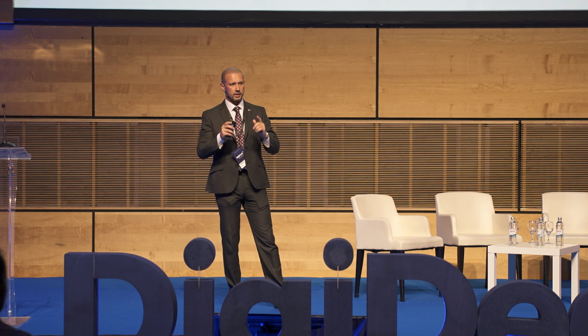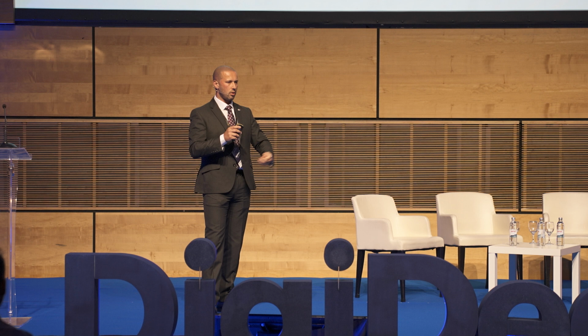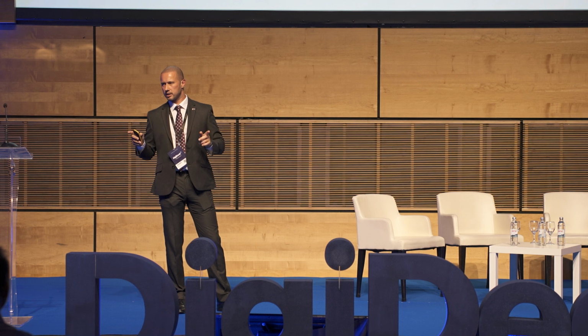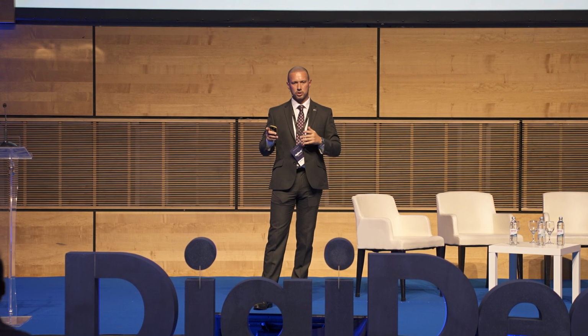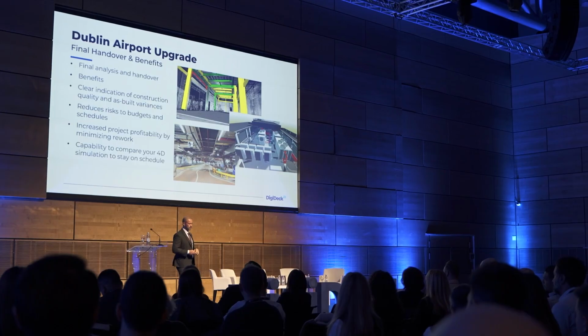We were solidifying that with the scans. So as we were modeling, we were coordinating, and then we were going out and scanning. Because we were scanning, the subcontractors on the project wouldn't just put something in. They wouldn't just have it drawn and say, sure, I'll run it there, because they knew we were going to check it. So everybody was trying to align to the model, which doesn't always happen. We know this, but it did on this project, so we definitely got the benefits.